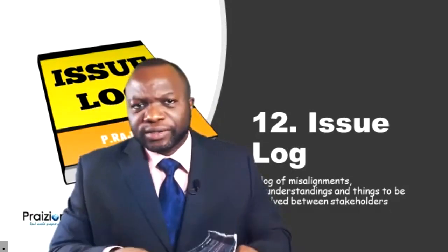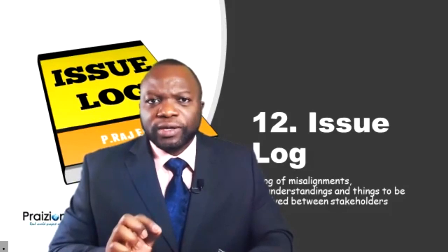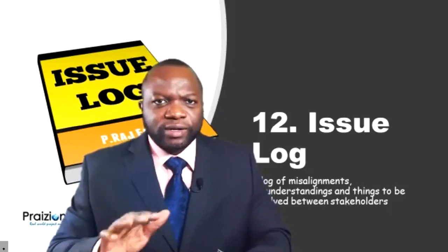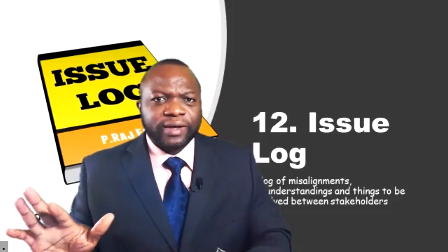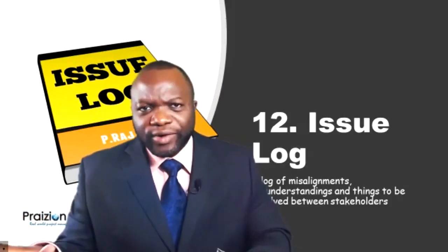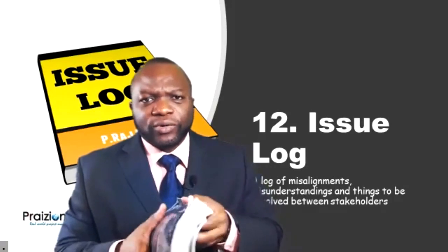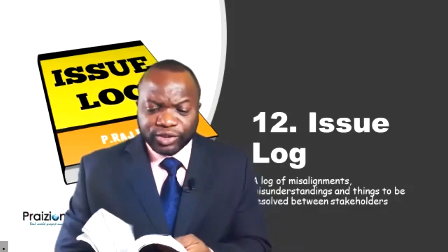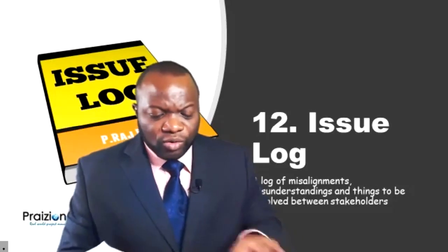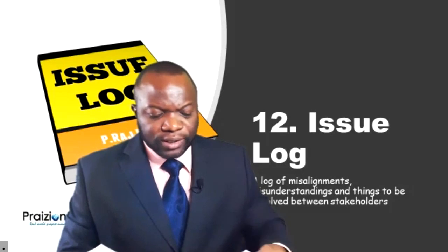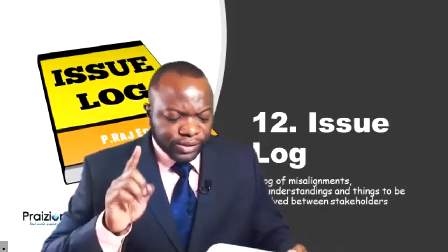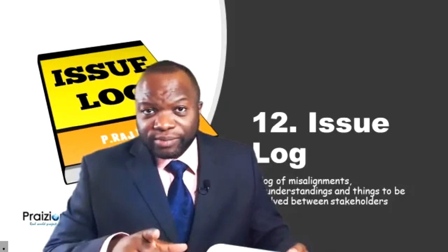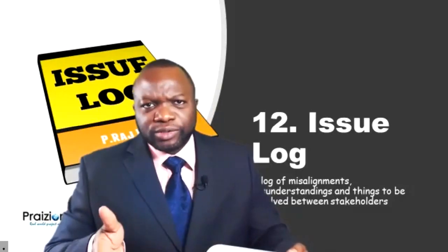So we've learned that issues are not risks. We've learned that the issue log is not a log of risks that have occurred. No, risks are tracked in the risk register. When they have occurred, they are also tracked and logged in the risk register, but the issue log is not for that. One more place of interest before we wrap up for today is in Manage Quality. Under Manage Quality, we have a 6-step blueprint from the PMI for how to solve challenges known as problems. You often hear issue and problem resolution lumped together.